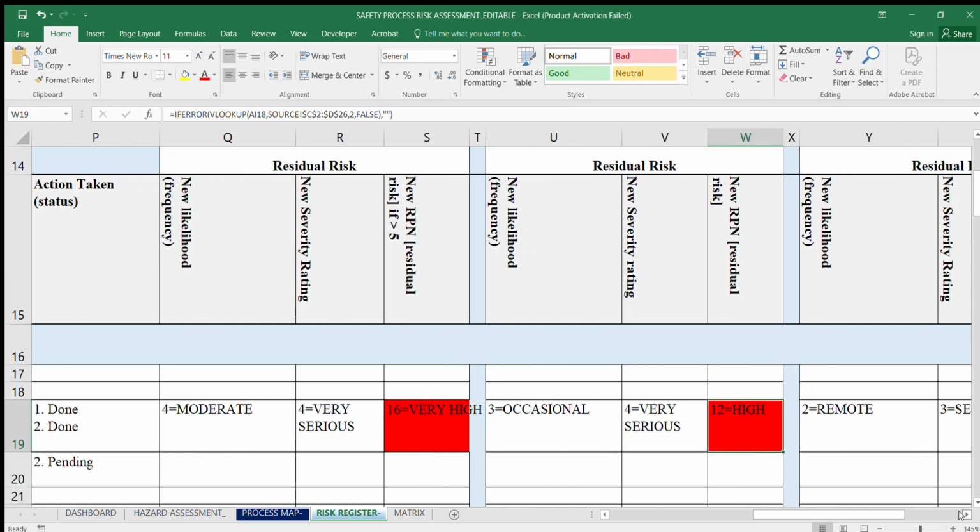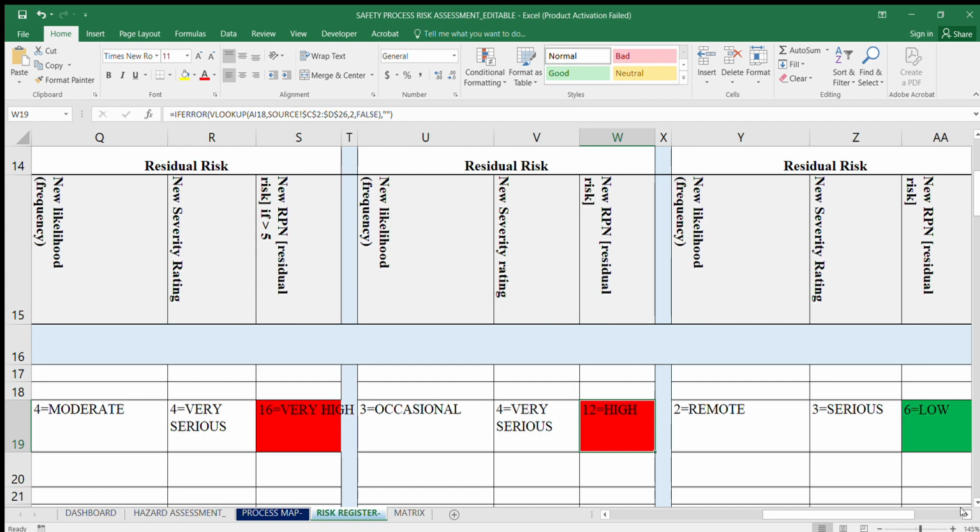So you come back again and you're doing now your third review of this particular risk. But at this time, no incident has happened. So you've done the same, or you've allowed maybe 3 months as well to just monitor the mitigations. But at this point, no incidences have occurred. Okay, and then at that point, maybe now your risk will reduce to a remote there, and then this will still remain the same, which is very serious. So you've gone back to your initial risk.